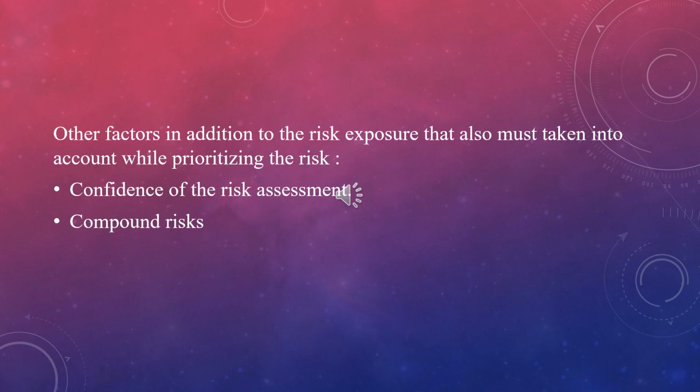The second factor is the compound risk. Some risks will be dependent on others. Where this is the case, they should be treated together as a single risk.